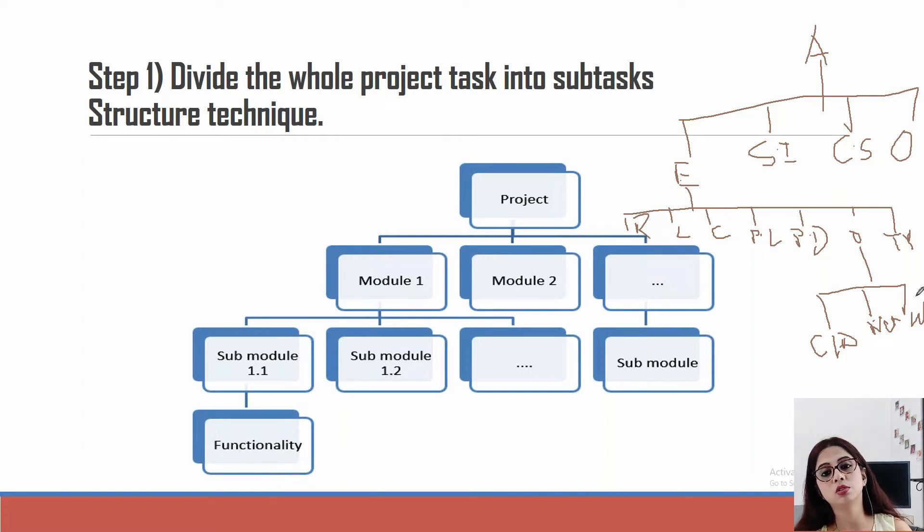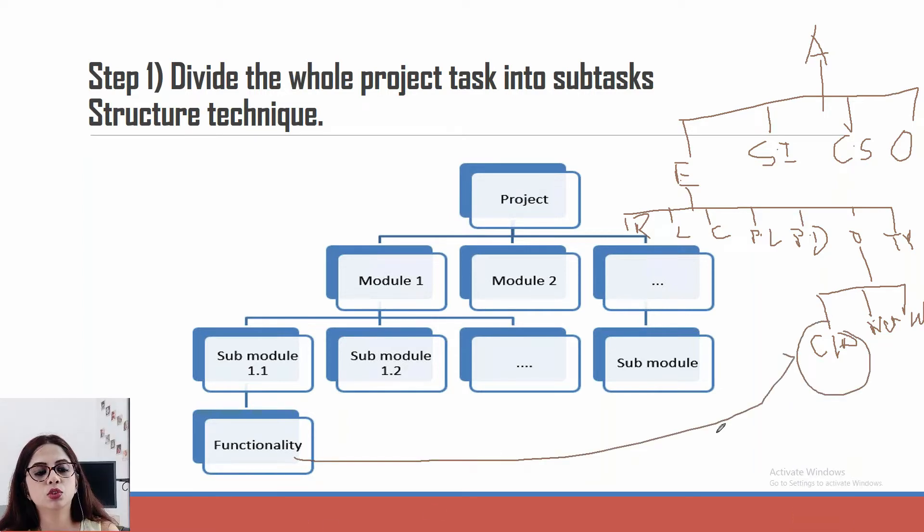So work breakdown structure is a very, very useful method of starting to estimate any project. So once we know that this particular functionality will need around five hours of work, so the estimation is five hours. This will need two hours, this will need three hours.